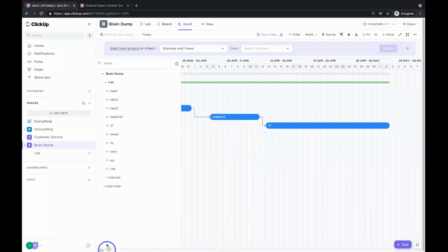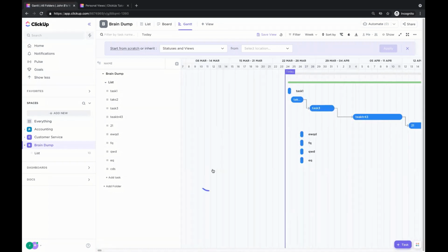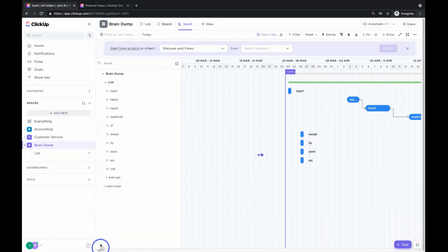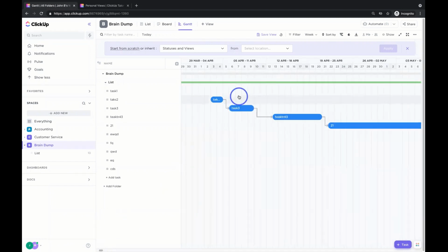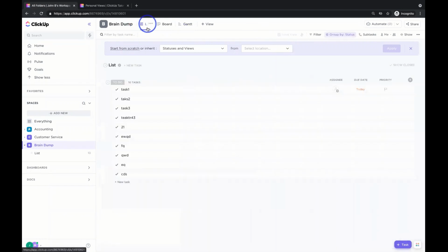Do you see that? So your Gantt charts are a great way, if these are all dependent on each other, we can move out the entire project just by rescheduling those dependencies on that particular task. So first, what I would do is create a quick space, dump down all of your tasks you want to. You can see the dependencies have now been created.